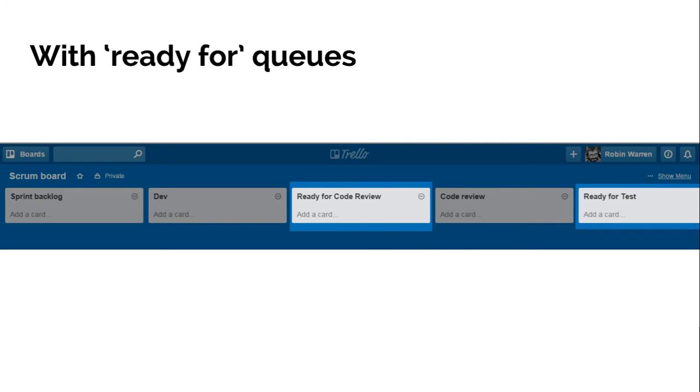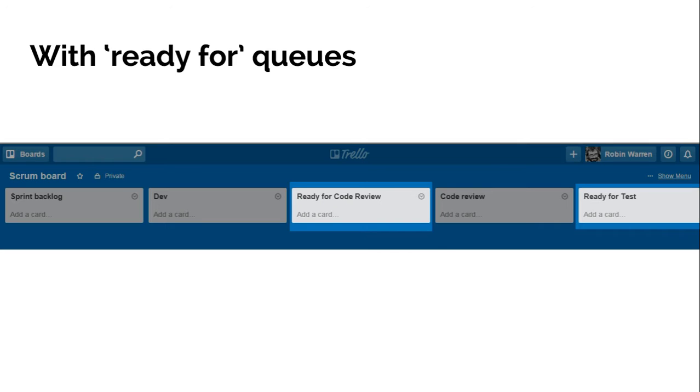This is one of the first additions I see people making, they have ready-for queues before those sections in the middle. So what that lets you do is you can look in your code review list and see a load of stuff in there, but it doesn't tell you is stuff building up because it's taking a long time to code review, or is it building up because it's ready for code review but nobody's doing it? So what this lets you do is just visually inspect that and get an idea of where things are building up in the process.